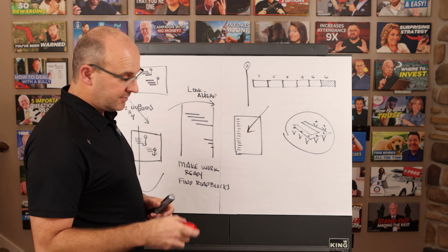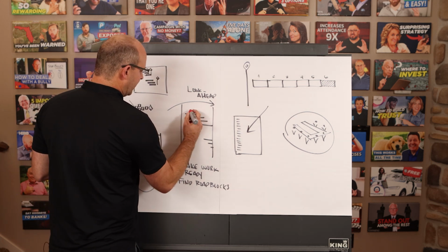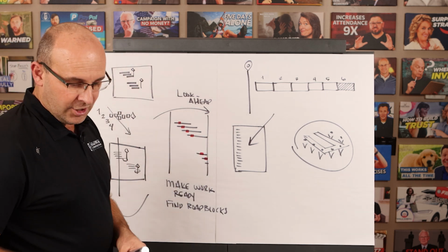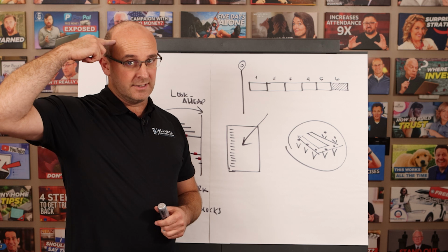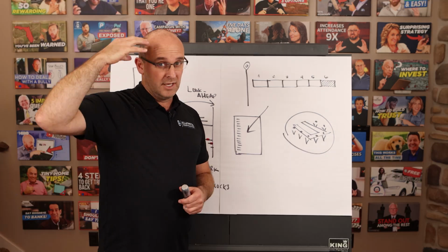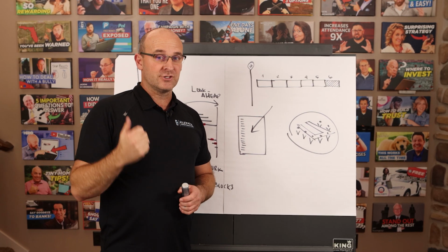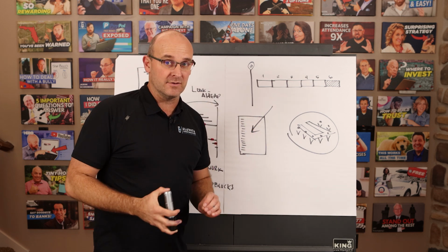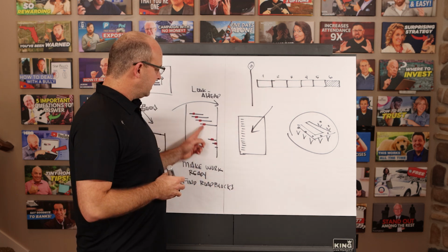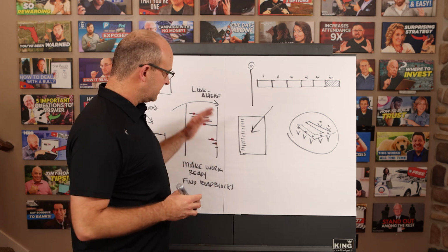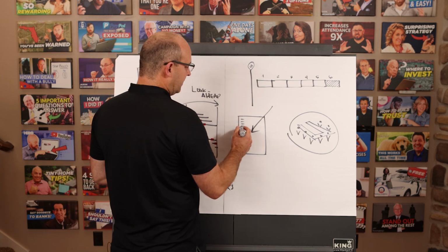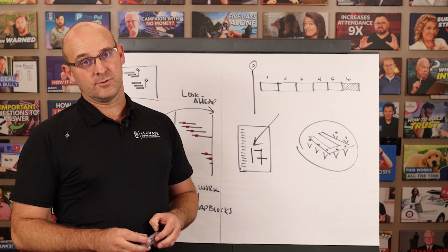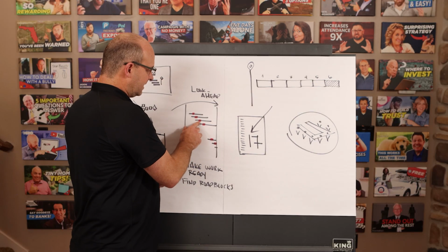So that means that if a trade partner, let's say they were the color red, any red activity inside this production plan in the next 6 weeks, you are asking them to, in their mind, 2D, 3D, 4D, imagine that area and track realistically how work is progressing and ask themselves and their office whether or not these activities in their scope, isolated from the look ahead, are ready according to these 17 items. And if they are not, that is a potential roadblock. And so what you would say is yes, yes, yes. Oh, nope.